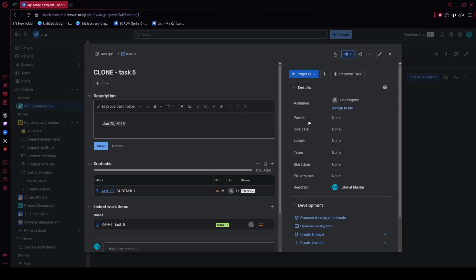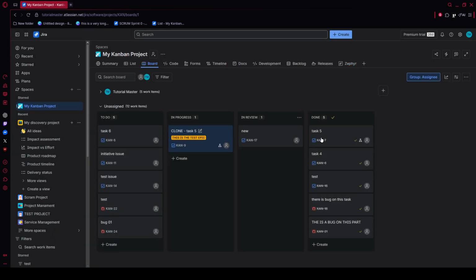With the hierarchy in place, move to the timeline and map dependencies. Find a milestone or work item, hover until the link handle appears, then drag that connection to the related item in another project. Jira will display the dependency visually, making cross-project blockers much easier to spot during reviews.